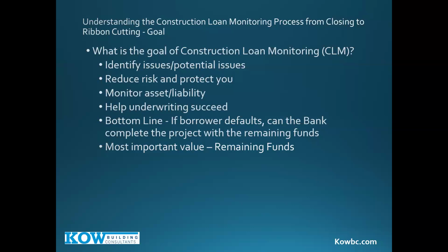Now, that's a little bit naive, because if the contractor gets thrown off the job by the owner, it probably is a messy divorce. We probably didn't get the best quality from their subs the last few months. If it was a money flow issue, we probably have some issues with schedule and quality of installation. So I'm not naive. It's not perfect. But once you get that project back up and running, can we finish it with the remaining funds?